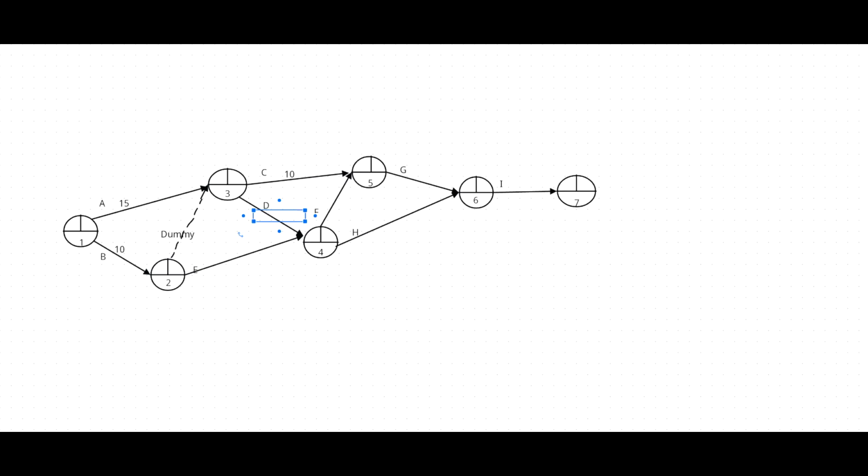Remember, dummy is not time consuming, not resource consuming. Therefore, the duration should be 0.